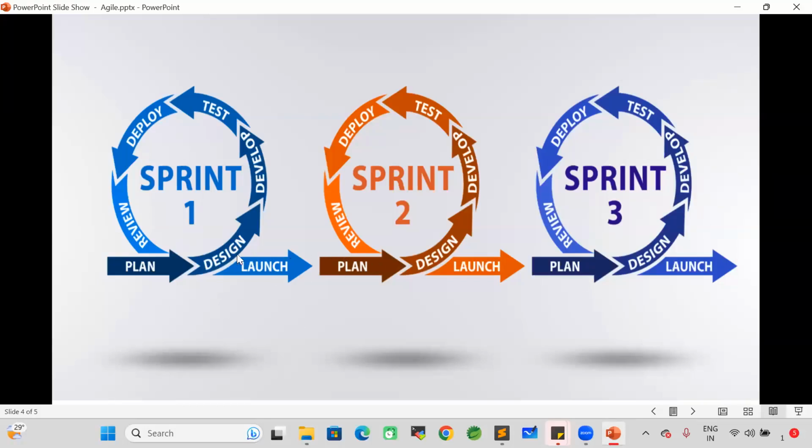In the Agile model, project will be delivered to the client in multiple releases. Instead of doing the big task at a time, we will divide into small tasks and we will complete it. Instead of delivering the entire project to the client at a time, we will deliver in multiple releases. Now, if a client has given 300 requirements, instead of developing and delivering all the 300 requirements at a time, we are going to divide them into multiple releases and we will deliver.